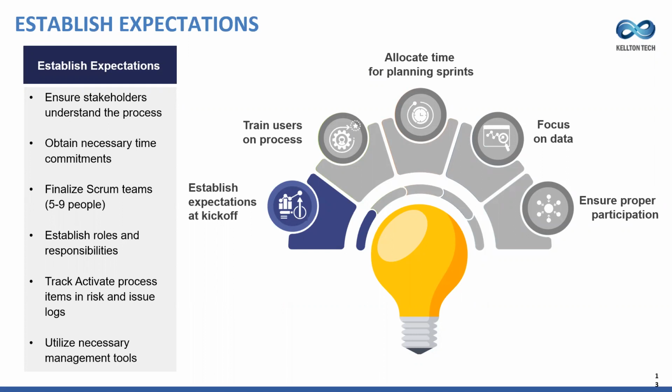And these daily status calls can't be 2-hour, 3-hour status calls, right? They're supposed to be 15, maximum 30 minutes, where people go in and talk about what they've actually accomplished, what they're going to be doing that day, and then anything that's blocking them from getting those things done. And if you have a huge team participating, well, that becomes unwieldy. You can't get the job done.